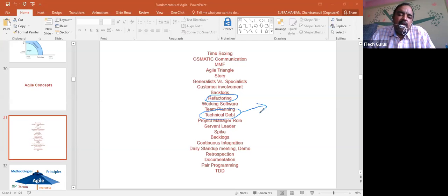Okay, now tell me, in Agile, they say that the size of the technical debt, listen here carefully, at any point of time should not be more than 2 sprints of work. You're able to understand this?